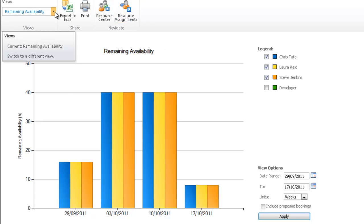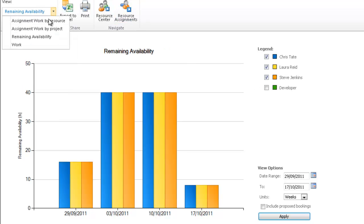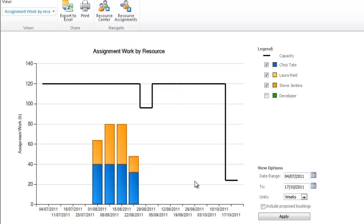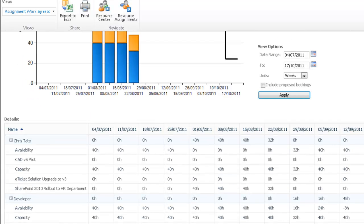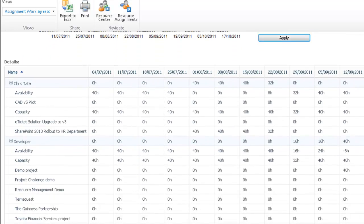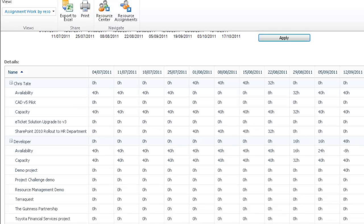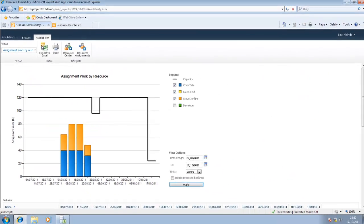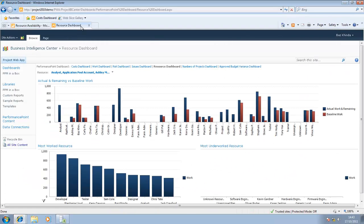There are other views available as well. What we see now is assignment work by resource. This view is essentially telling us that the only two people doing any work at this stage are Steve and Chris Tate. The black line signifies the capacity for the selected resources, so we can see we've got a lot of people sitting around not doing much. But if I scroll down, I can see what people are working on at any given time—which project, during which week, and how much work they're doing on those projects.